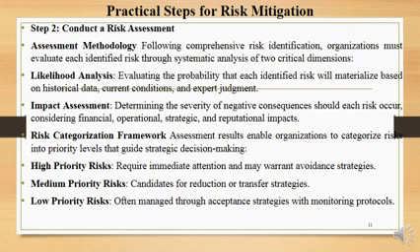High priority risks require immediate attention and may warrant avoidance strategies. Medium priority risks, candidates for reduction or transfer strategies. Low priority risks, often managed through acceptance strategies with monitoring protocol.